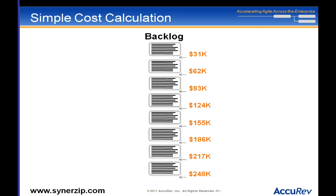This gives me levers for measuring what I'm getting from various teams. It also allows me to calculate: if I want a release with five iterations, that's going to cost me 5 × $31K = $155K — very easy, without complicated spreadsheets. I went to the controller once, got that number, and can apply it on a regular basis. I can also use this for a specific story: a five-point story costs $1,400 × 5 = $7,000. If I think I'll never get $7,000 in value from that story, I have to really question the ROI.